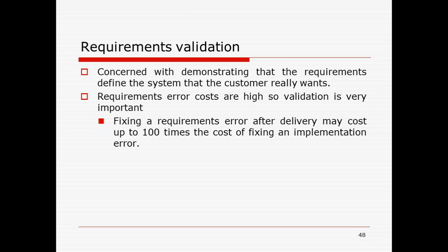If there is some error in the requirements and it is found in the later phase, when the system is implemented, then the cost of correcting that requirement is very high.